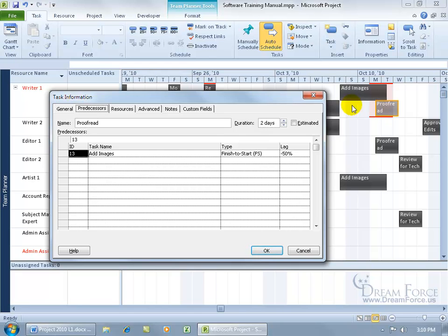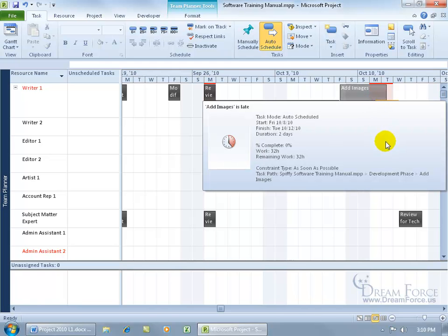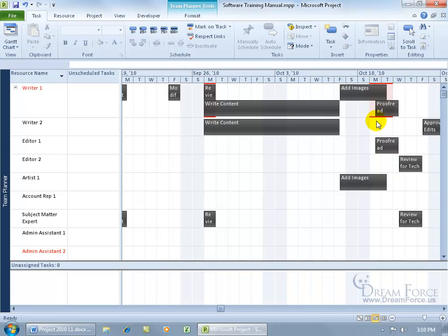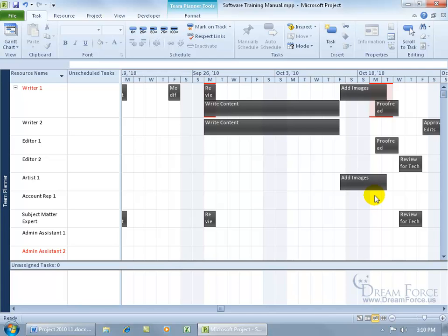And the problem with that is that having the same resource assigned to both tasks, then he's working on this one when this one is about halfway completed. Let me click off to start on that one as well. So, at least for 2 days, it looks like he'll be working 16-hour days. Well, that is if we want to give him overtime. Okay, so there's the Team Planner.